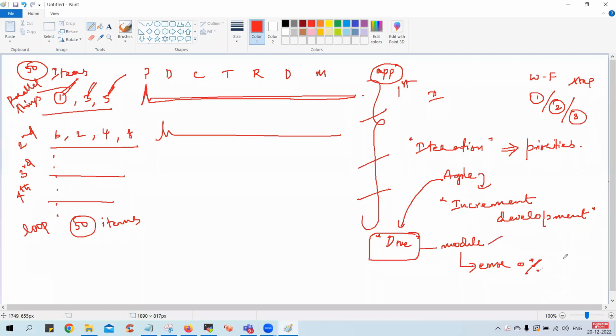People who work in the IT industry will be very familiar with this word. They keep on saying done, done, done. So this word done has become very popular from Agile. Agile says that you should mark your item as done only when the entire module is done, I mean completed, and the chance for error is 0%. That means the entire activities are finished. Maybe tomorrow or the day after, somebody may point out that something is not working. That will go as a support ticket and we'll start working on fixing it. That is secondary. But at the time of development, it is finished as per the expectation.